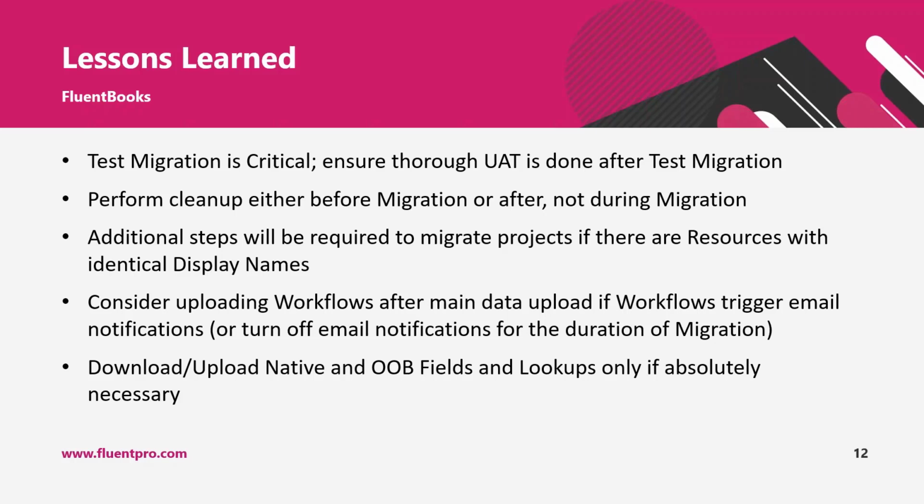If this cleanup was not performed before the migration, then it should be done after the migration in the new environment. But we strongly recommend not to do this cleanup when the migration is already going, because in this case, it could be possible that your downloaded set of data is now different from what is in the source. So you either need to re-download the data or clean up the downloaded set of data, which can cause additional efforts and actually violate the integrity of the data that you are migrating.